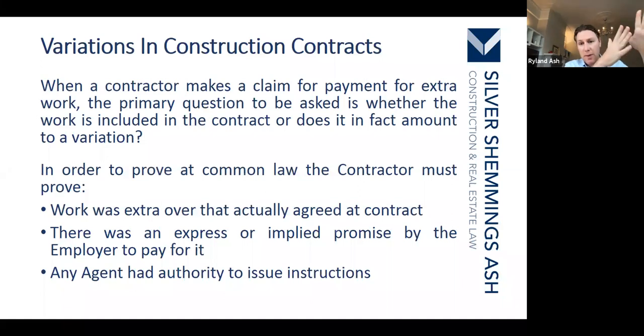The best way to avoid this situation is, of course, to have from the outset in the agreement or somewhere recorded that certain people will have authority to provide instructions. If you don't record that, then the answer will be in law that it is the person who has apparent or ostensible authority.